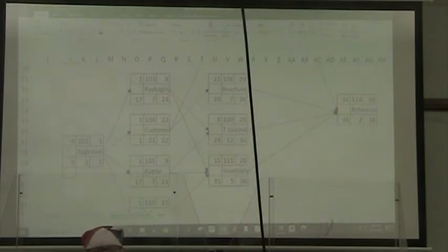All right, so you'll notice our early start and our late start are the same here. Well, the number that goes in here is the amount of slack time. So if we say equals 0 minus 0, our early finish minus our late finish, it's 0. Except I did it backwards. It should be equal to late finish minus early finish. Oh, silly me. Of course, it's still 0, but that is going to make a difference in our subsequent calculations.